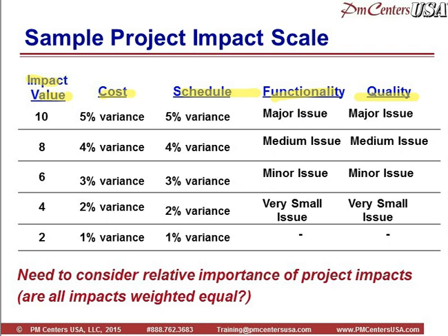So if you had a risk event that had a high cost for the Y2K project, who cares? If you had a schedule risk, that was huge, because again, there was a definitive deadline. When 12/31/1999 rolled around, that was it. When those clocks went to the year 2000, it's too late. So obviously, schedule impacts were much more important than cost impacts around the Y2K project.